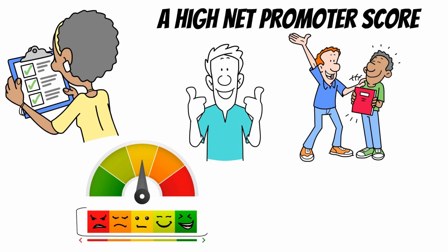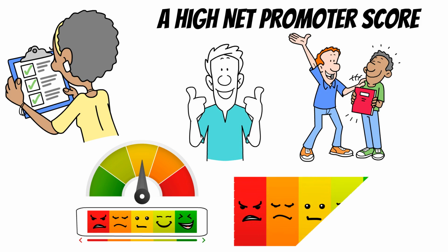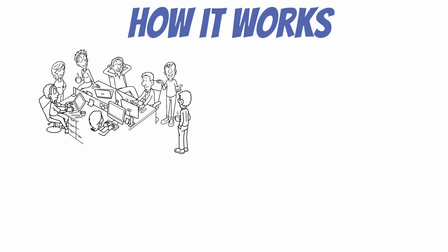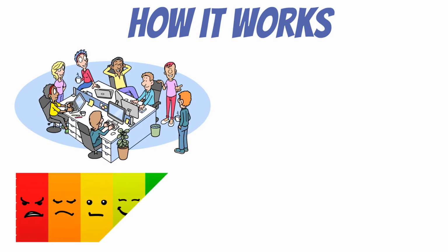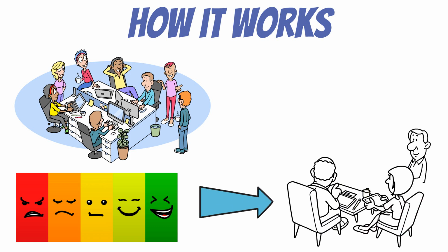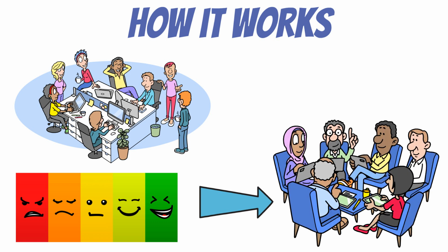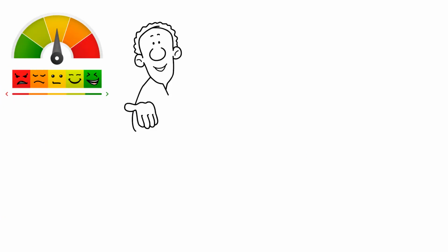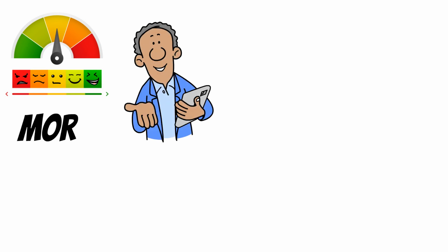There is also a mood chart. This can track the mood or reactions of a group of very important stakeholders: the project team. How it works is that at the end of each day, project team members can use colors, numbers, or emojis to indicate their frame of mind. Using this, tracking the project team's mood or individual project team members' moods can help to identify potential issues and areas for improvement. Mood boards can be subjective, so another option is to measure project team morale.